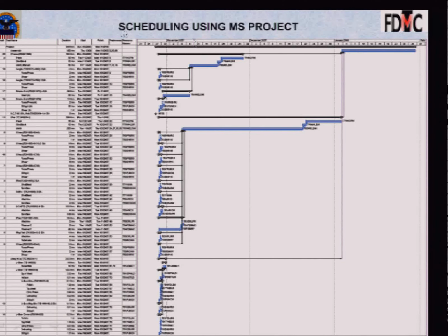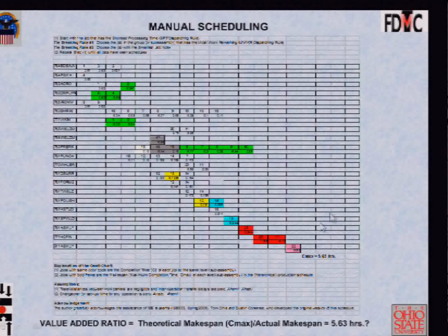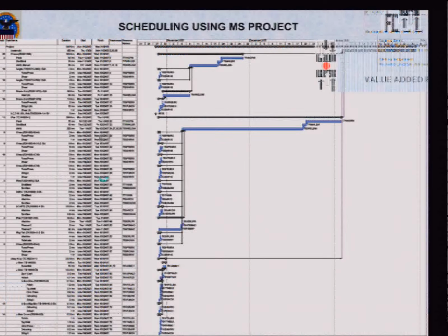you could do all of that. So, again, even with Microsoft Project, what you saw done by hand using Excel, is basically what was done using Project. And this again, this whole total duration, think of this as a critical path with resource constraints factored in. Please don't believe that Microsoft Project cannot handle resource constraints. That is only the limitation of the individual who says Microsoft Project can't do that. Of course, there are much better, resource constrained project scheduling softwares out there, but Project can be used to demonstrate that value network mapping is viable and works.